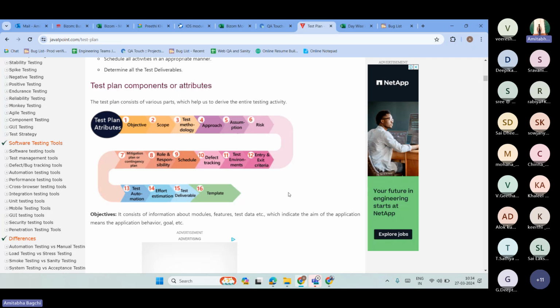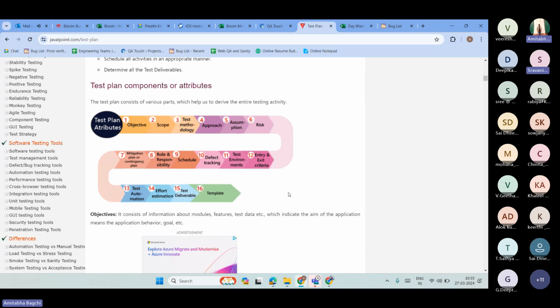So let's keep that aside. When you are planning in the test plan, for this 13th pointer, you will just write that once the manual test cases have been stabilized and passed more than 90%, then we'll start the test automation with the feasible test cases. And you will have a rough planner there. But test automation itself needs a test automation planner.